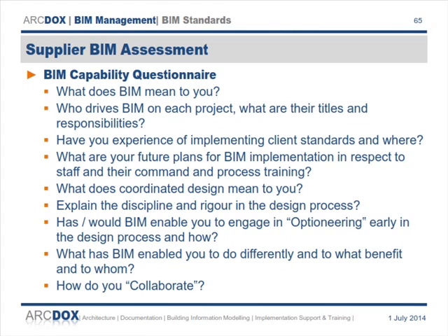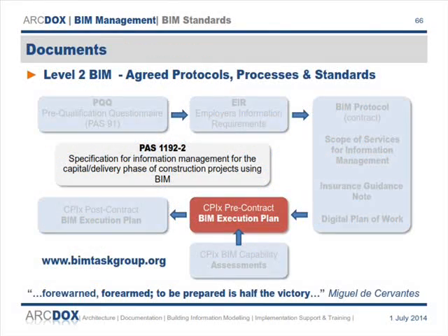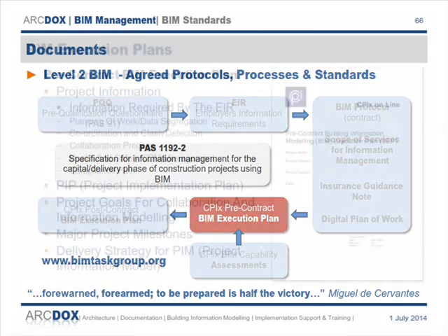So what do they actually mean to BIM? But some of them are important. What has BIM enabled you to do differently, and to what benefits and to whom? It's important to understand how to answer those questions. And then once you've completed those capability assessments, they sort of determine how you have the capacity to deliver the project. Those documents will then inform a pre-contract BIM execution plan.